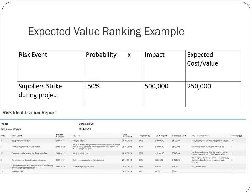Another technique for prioritizing risk is looking at the expected value — discussing the risk impact only in terms of monetary effect. As we see on the screen, for example, a supplier strike has a 50-50 probability. The impact, if that supplier strike occurs, is $500,000, so the expected value is half of that: $250,000. We multiply probability by impact. Some companies have adopted this method, and the digital tool allows you to record either type of risk impact.